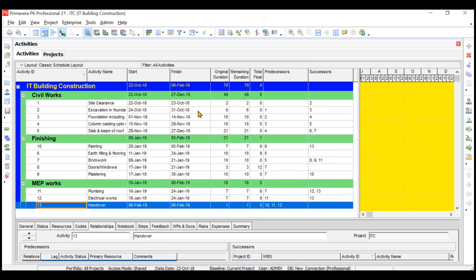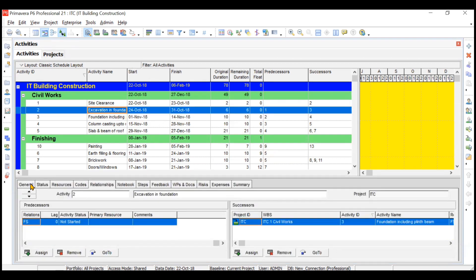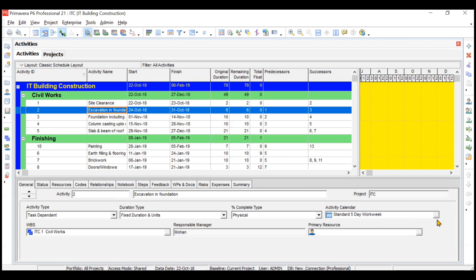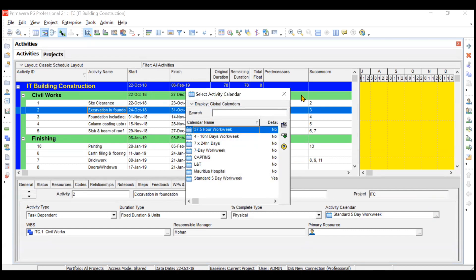We will be learning more about this when we assign and change the calendars. The next activity starts just after excavation on 1st November and goes until 14th November — this may be due to a five-day work week calendar. You can see the calendar in your details tab. If you click on a particular activity and go to the general part, you see a five-day work week is assigned. We can change this calendar in future videos, where we'll create a calendar as per our project policy and assign it.